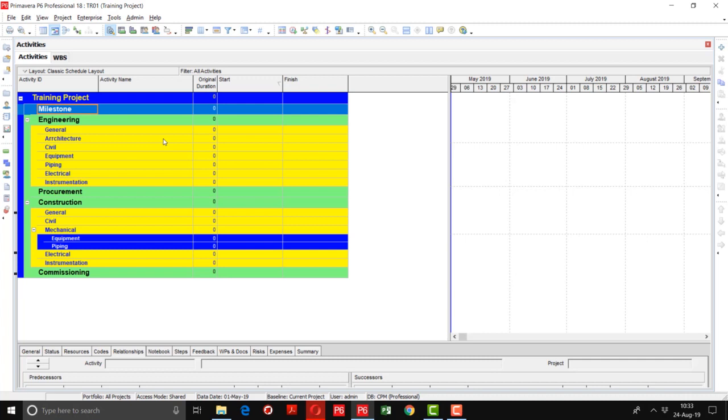So be careful that every scope defined in your project statement should be covered in the WBS, because you have to plan accordingly. If something is missed, it means that you are going to miss that component. And the other important thing is that excessive decomposition can lead to non-productive project management effort, inefficient use of resources, and decreased efficiency in performing the work.